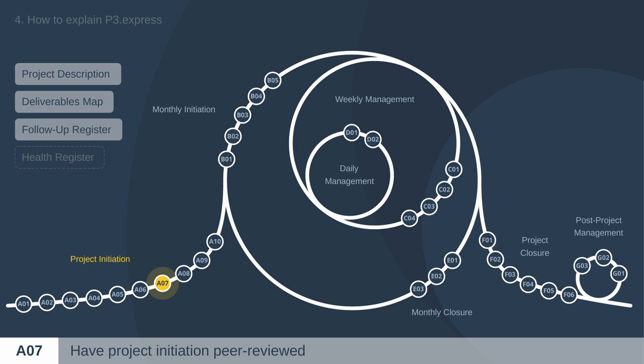P3 Express recommends asking a different project manager each time for the peer review, to help with the learning process across the organization. The peer review result goes into the fourth artifact — the Health Register — which is used for two purposes: results of peer reviews and results of stakeholder satisfaction evaluations. There are also monthly peer reviews in B2 and one peer review at project closure in F3. Peer reviews are very well received in practice, and as a trainer you should insist on their importance — even suggesting that if organizations implement nothing else from P3 Express, they should at least try peer reviews.